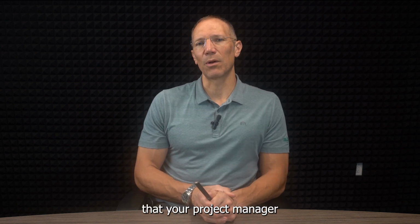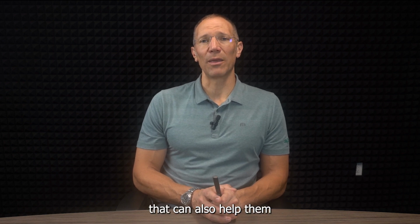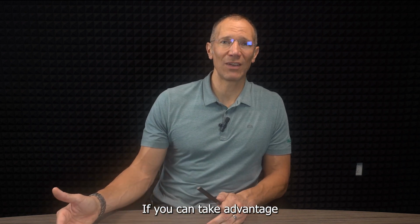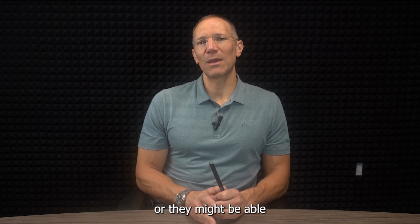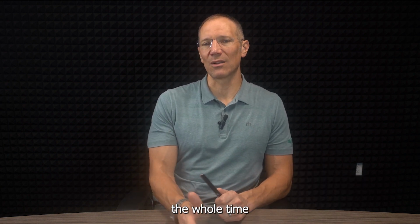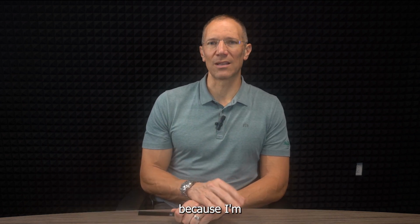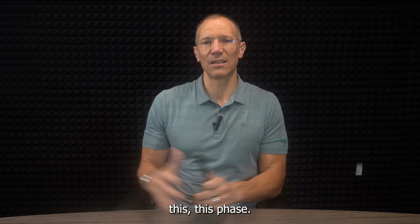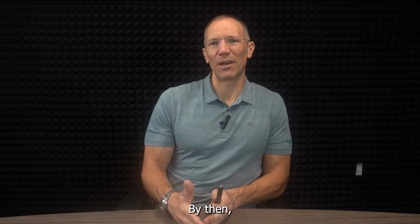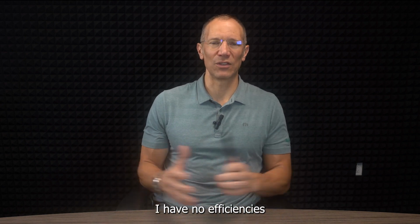Those are the kinds of things that your project manager can communicate back to the team internally that can also help them cost out what that execution might be, or price out what it might be if you can take advantage of these efficiencies. Or the project manager, if you're on the front end of it, may say, hey, you know what? I can shrink the whole time we're on this project down if you let me put 3 crews on this project for the first month, because I'm going to be able to get through this phase. And after that, I only need 4 or 5 guys. But if I don't, it's going to take me too long. By then, the other laborers are going to be there, the other trades are going to be on the project, and at that point, I have no efficiencies to gain.